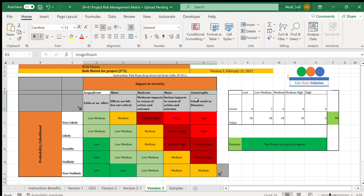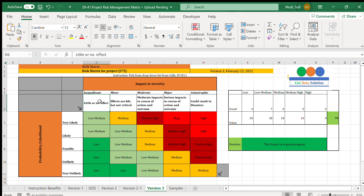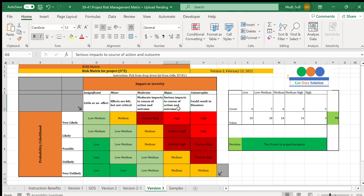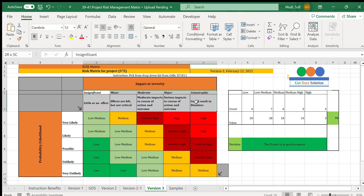Let's look at the terms in detail. The impact levels are five categories: insignificant, if there is little or no effect; minor, if effects are felt but not critical; moderate, meaning moderate impact to the course of action and outcomes; major, meaning serious impact to course of action and outcomes; and catastrophic, if it could result in disasters.